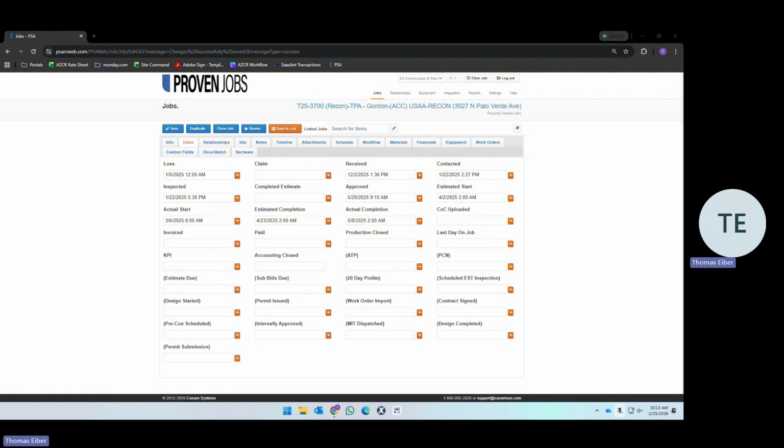If you run into any issues internally, major delays, or any roadblocks, you go to a senior PM. If you're having trouble working with one of your project managers, if they're not providing updates and not providing what you've requested, you can discuss that with the senior PM. You can escalate further to leadership if you don't get anything. But realistically, you should speak to the PM first about any performance issues. Go to the lowest level first to try to solve it. If the PM does not take your advice, go to the senior PM, and beyond that, you escalate to ownership.